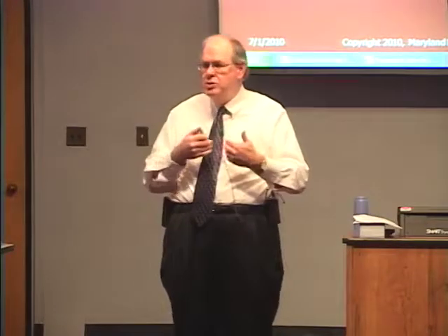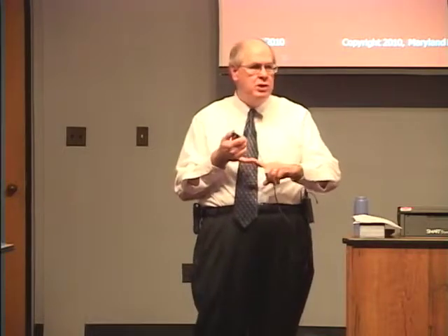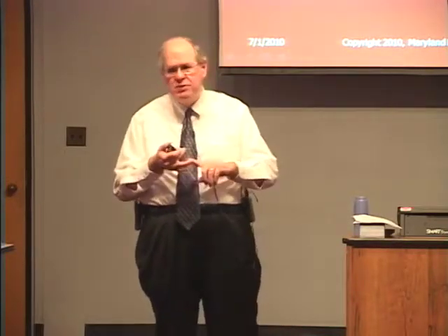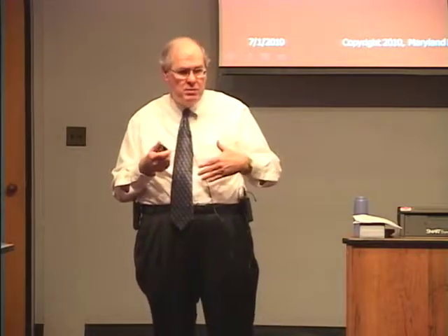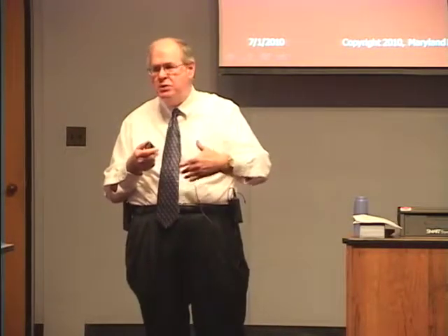So these are the kind of things that you have to look at in the beginning. How am I going to monitor the contractor's performance? And you may likely have a mixture of these things. If you have a complex contract, you may have some elements that are monitored by passive means. You may have some elements that are monitored by active means. You need to think, and you need to put these in your specifications so vendors know they're supposed to do it and they can include it in their price.